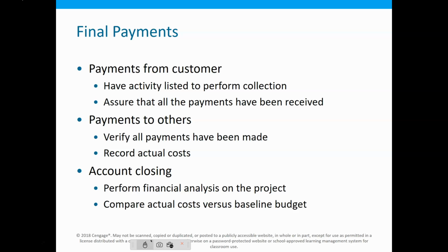Personnel are always going to vary in performance, so sometimes that's going to be an issue. We don't have control over external events, things like new laws, new standards, new things that happen. We don't have any ability to control material costs throughout that project unless we buy all the materials up front. But then we have those storage costs and maintenance costs of that equipment. So there are always going to be things that we're not going to control.